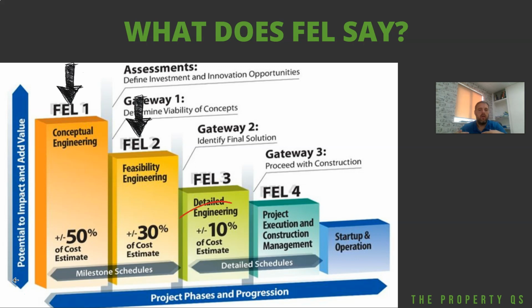We've figured out exactly what it is that we want from our project. If we put this in terms of a property refurbishment project, we would need to have all the drawings done. We'd need a detailed specification of what we're looking for in our property, the finishes that we want to put in. We'd want to have the kitchen design done, the bathroom layout done, and full surveys of the existing building before we can get to a detailed cost estimate.